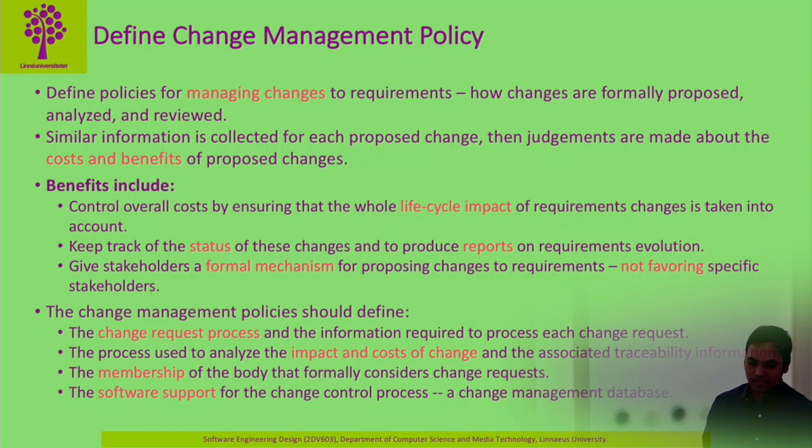So the change management policy should define how the change request process will be handled, and the process to analyze impact and change. There should be a clear process to analyze the cost and benefit of each of your changes. And also the policy should define who will be on the change request management team, and what software you will be using. You can use a change management database, for example.